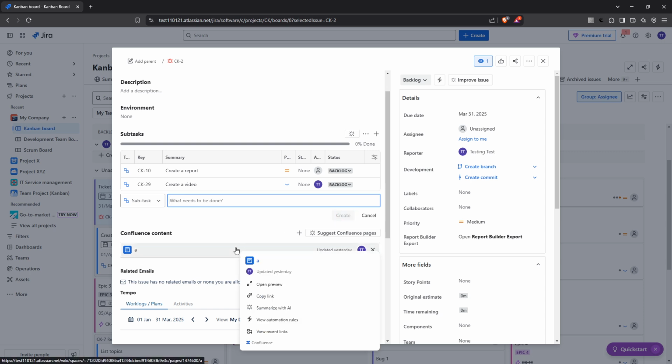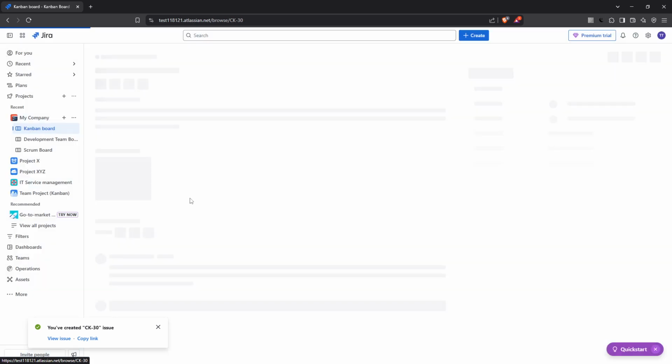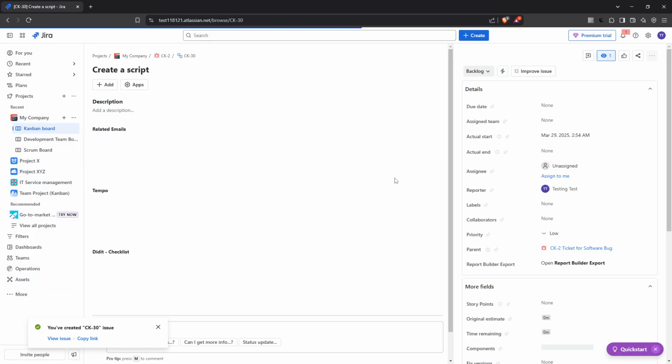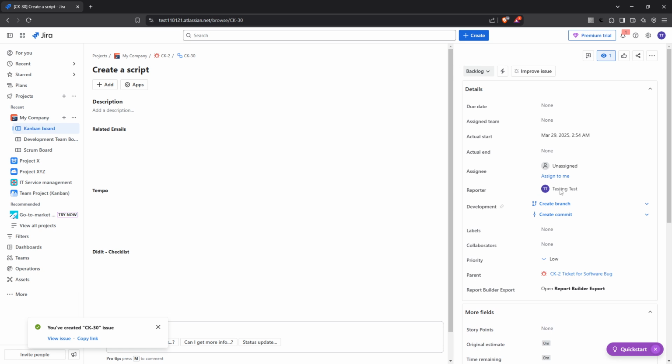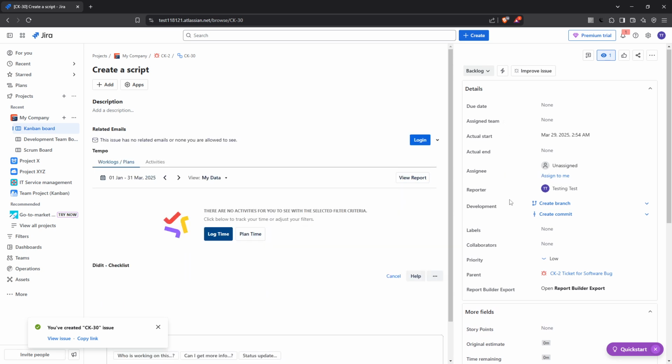There's an important tip to keep in mind when working with subtasks. Use them to break down components of development work, testing, or research. They are not meant for planning levels but are perfect for execution, allowing you to track progress on bite-sized pieces of your project. Let's talk about best practices for using subtasks effectively.